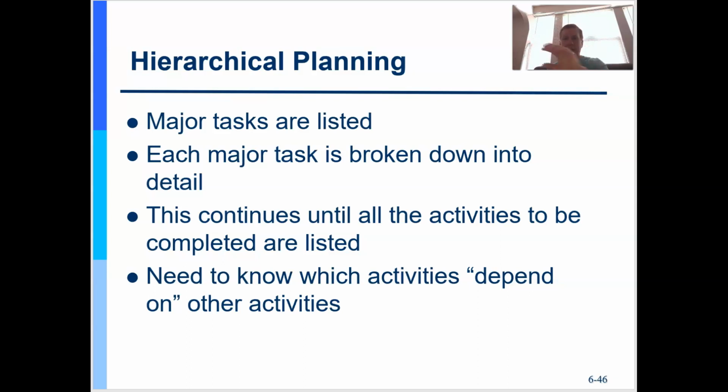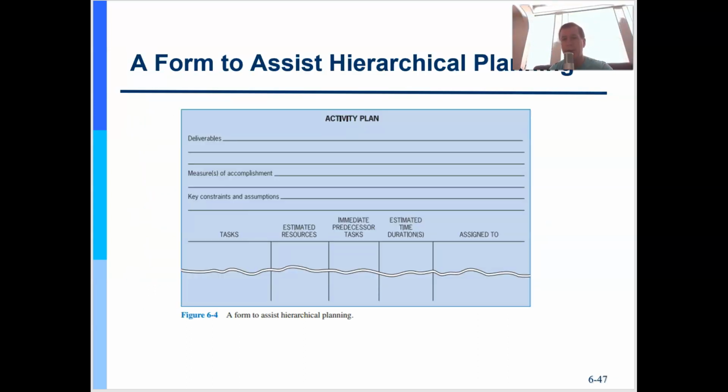And then under tires, I'm going to break that down into the next levels. I need to have a front tire, which is very different from a back tire with all the gears and things that go with it. So there's a hierarchy that develops in how I'm going to plan it, all the way down to the activities which form the schedule.